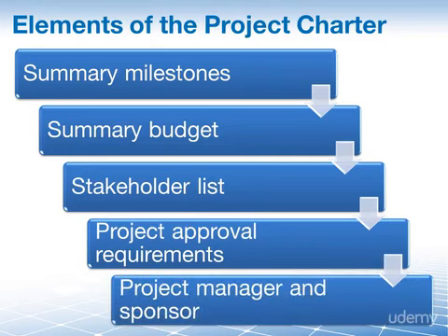And of course, the project manager and sponsor. The project charter includes the name of who is assigned as project manager and as sponsor. It describes what authority they are given. So for the project manager, the project charter gives him or her the authority to expend resources, not only financial resources, but also equipment and human resources that you need for this particular project and to do the work. And the project sponsor, named by the project charter, has the authority to make certain decisions with respect to the project.